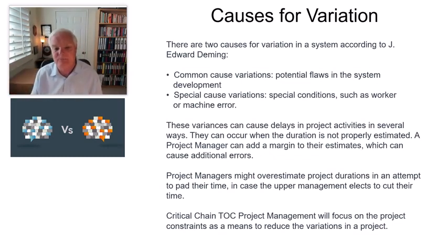That puts us in a position where we've artificially created a schedule and a process that is not accurate. It is one of those things that people do intuitively in an attempt to prevent this: if somebody's going to cut time out of my process, I'm going to overestimate it so that I have the ability to pull back on that.